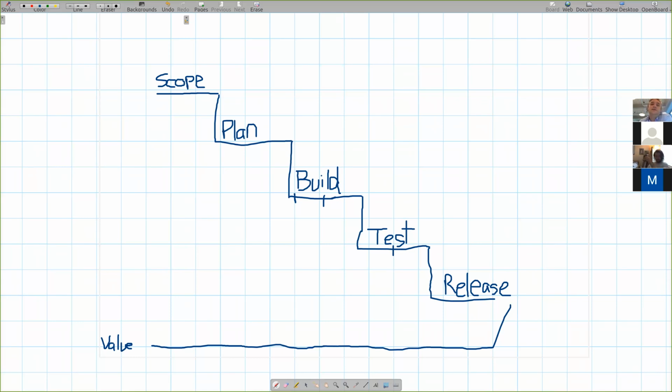So this process goes by a couple names. Non-pejoratively, call it traditional project management. Pejoratively, it's referred to as waterfall. Because as we're going through all of these steps, you generally don't go back to building once you've tested, which is especially a problem because, as we've noticed, you find something that's broken, well, that team doesn't exist anymore. Maybe a contractor can fix it. If customer gets something in their hands, they go, this sucks. You generally don't rescope the project after that.